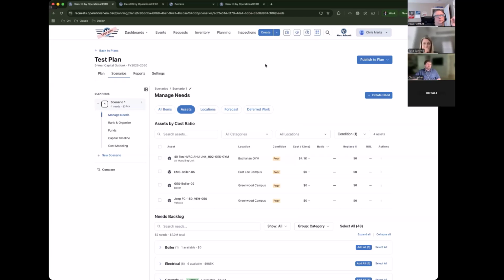So right now we have it by system. Even if you were to look at it by system and then by rooftop unit count. If you were to look at Jenkins Middle School, it would say rooftop 1, 2, 3, 4, 5, 6, 7 replaced in 2024, due for next replacement. I think it's a 20-year life expectancy, so it would be 2044. It would be set out 20 years to replace all of them, but we do have them as separate systems. Would it help if I pulled that up so you guys could see how we have it?